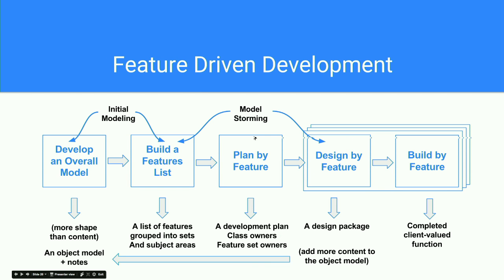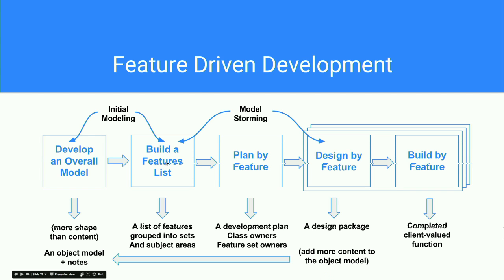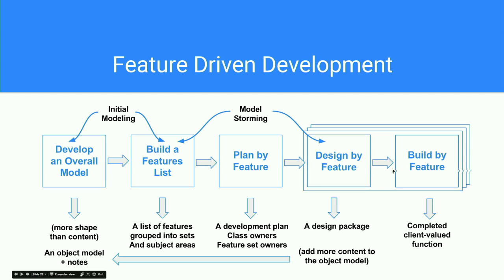Here is a simple diagram of feature-driven development and how it works. Initially, we develop an overall model and architecture-based framework. We build a feature list so that we can track everything on that basis. Once the feature list is done, we plan by feature — which features to include in which release cycle. Once planning is done, we go for design by feature — designing the feature architecture — and then build by feature.